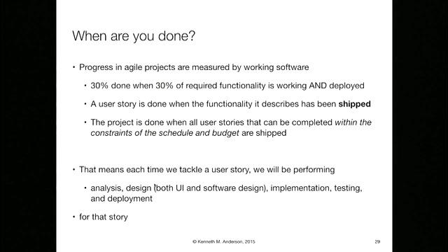And what's great is if you've got that whole vertical slice for one feature, yeah, maybe it takes you 2 iterations to get there, so your first couple of iterations don't deploy anything, and you're 0% done. But you finally get it all in place. Now, add the next feature. Suddenly you've got your front end working, your middleware working, your back end working, and you can just extend until you get to the full system. So a lot of the work does get front-loaded, but there's no hiding from complexity. The complexity has to be tackled head-on.